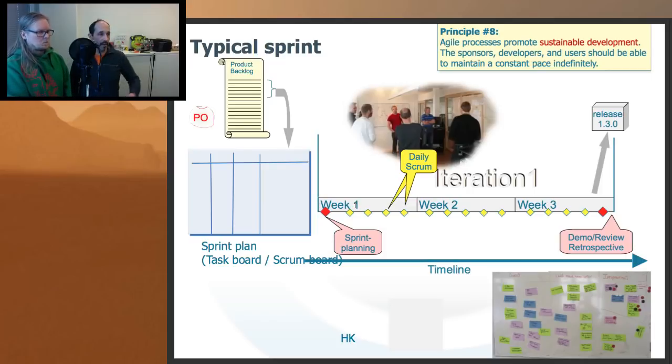And then the sprint goes on, and in the end, there are 2 things that need to happen, or in fact 3. The important thing is that we release something, so we deliver something for the customer: a workable piece of software where the customer gets first-hand feedback about those features, those user stories that were implemented, and that way can understand his or her need better.